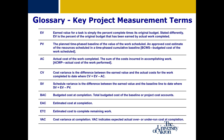The concepts of earned value — the value of work completed — and plan value — the baseline costs of work planned — are foundational to other concepts and formulas that help determine variances to project costs and schedule based on actual results. These formulas help a project manager determine the estimated cost to complete the project, which is valuable for making decisions, approving more project funding, or even stopping projects so far over budget that the ROI is no longer relevant. A cheat sheet related to this is available in Springboard for this week.